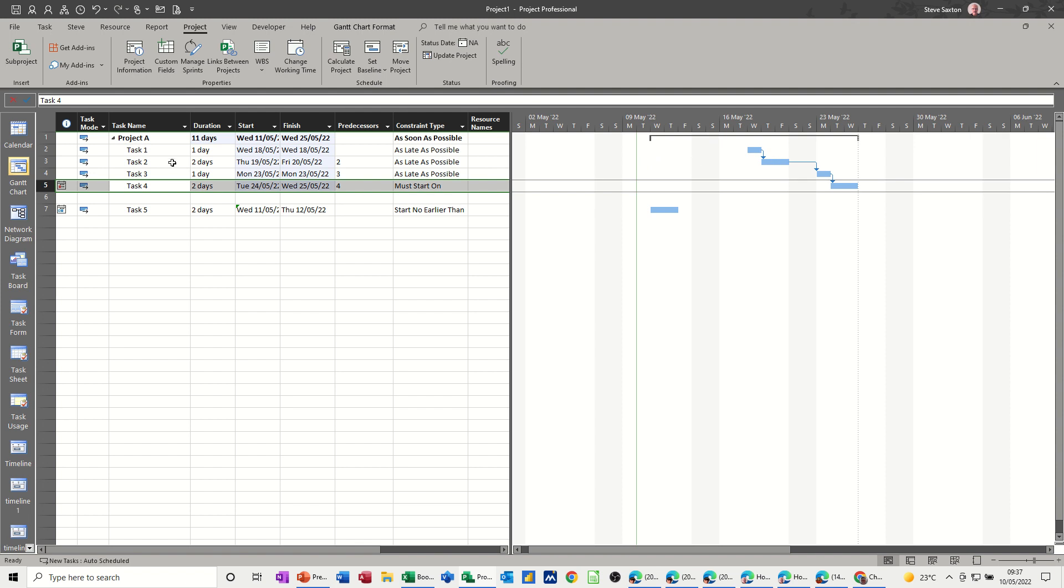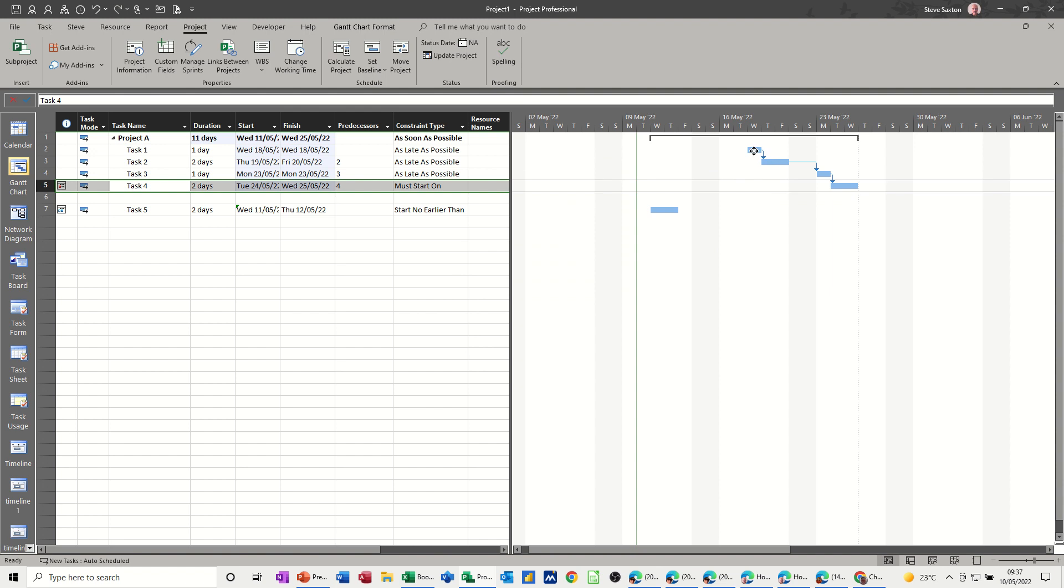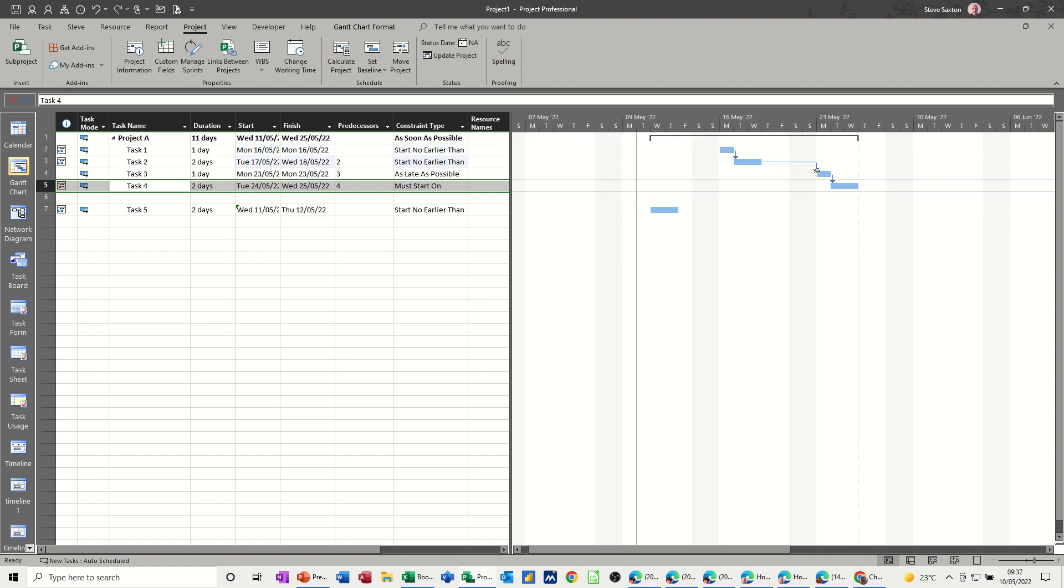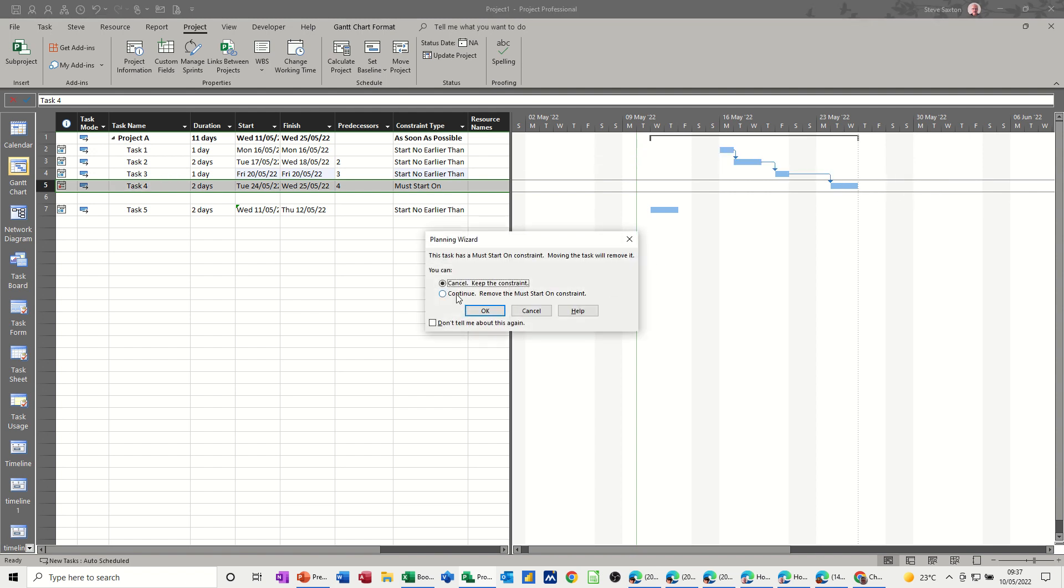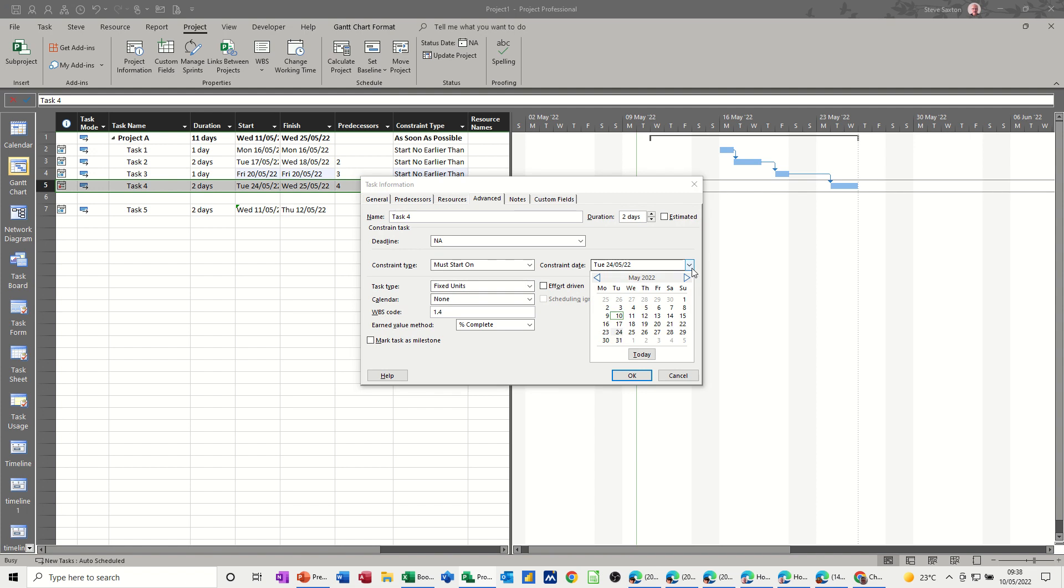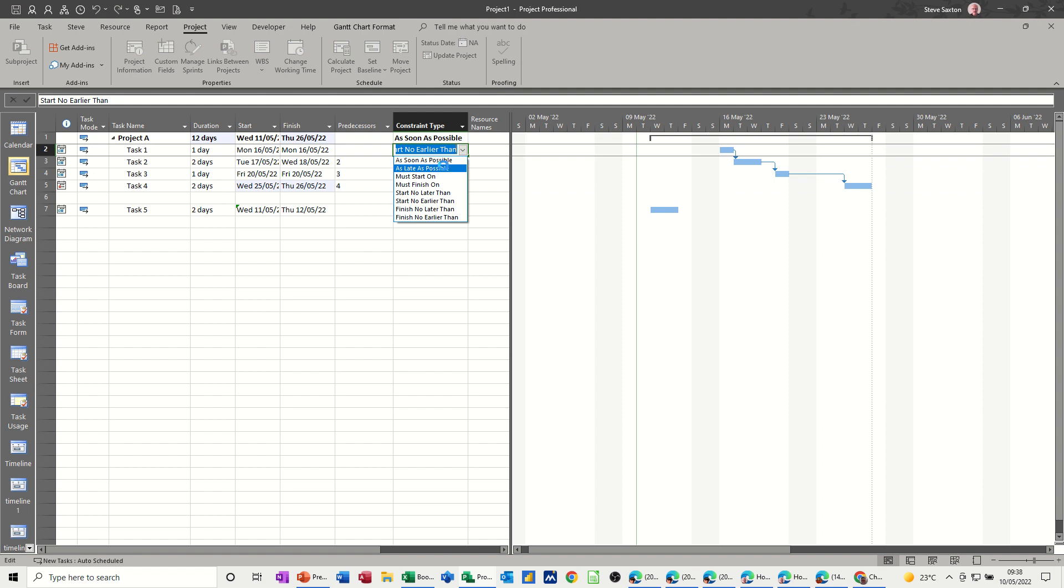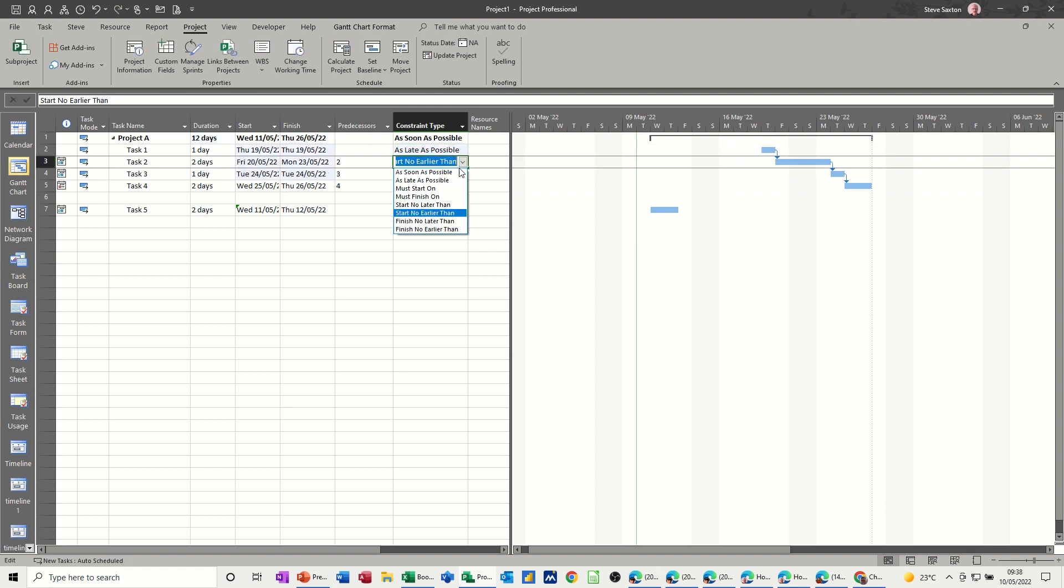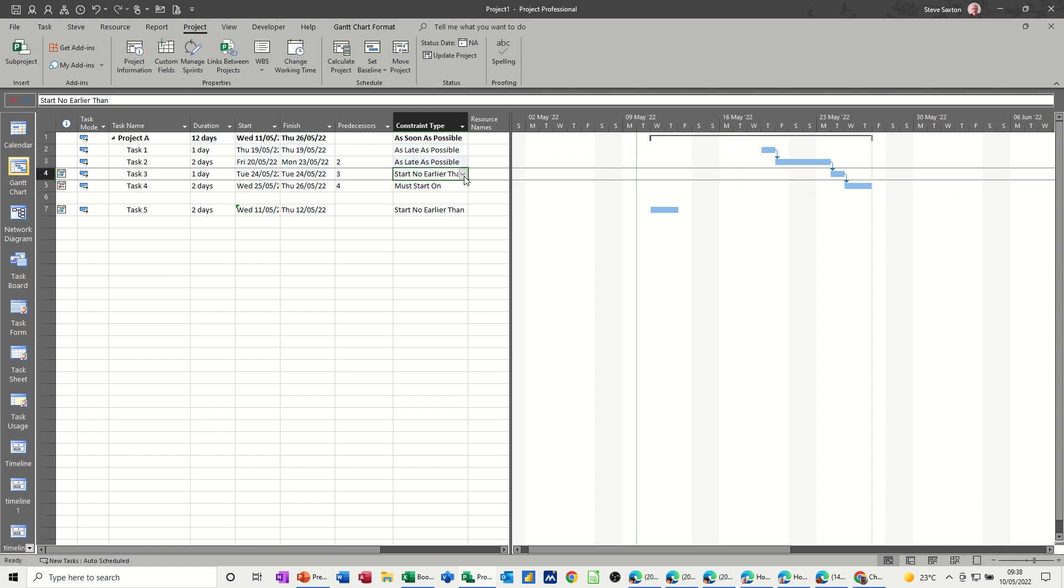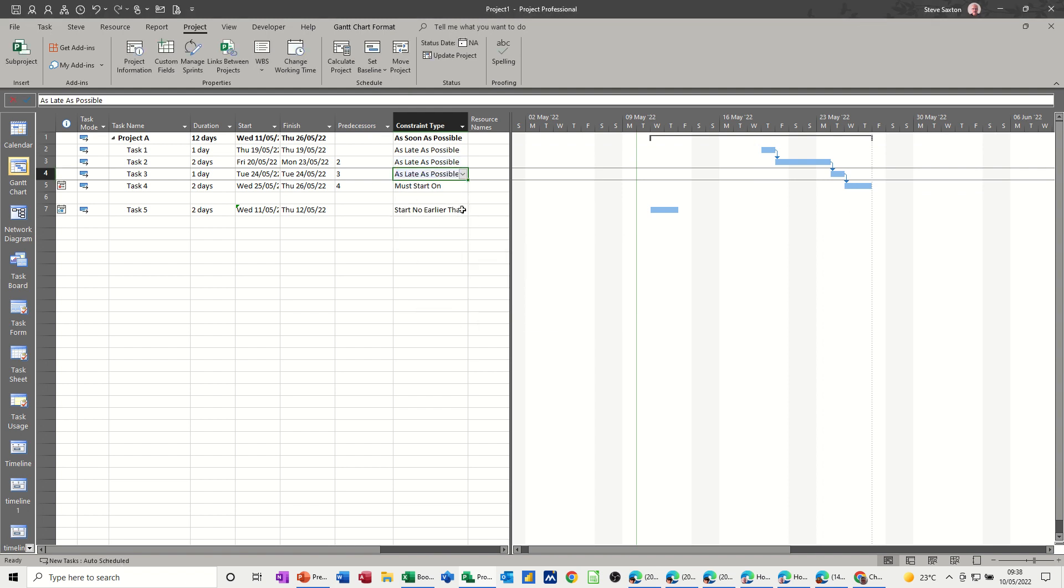And I think the best way to get your head around it is to do it like this and have a little play around. What happens if I can do this task before that? See, it's asking me to remove the link. What if I want to pull the whole thing back? Can I pull it back? It does let me pull it back, but it's just making these gaps bigger and bigger. And if that's okay, that's fine. But if I push this forward, I've got a constraint on that. That's why it's asking me to do that. So I need to double-click into that and change the date. So I'll just put that forward to the 24th, 25th, and it just moves forward. But it's not pulled the rest of it because these are now changed. They're no longer on as late as possible. So as soon as you put them as late as possible, everything moves forward again and it jumps about. So that's just a quick look at those basic ones.